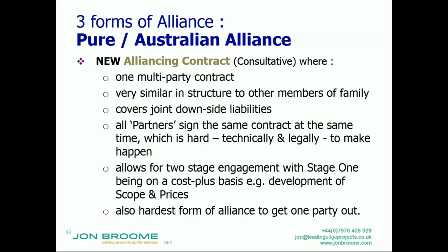This is one multi-party contract which all parties sign at the same time. It's very similar in structure to other members of the family. It does cover joint downside liability. So if my project comes in late or over budget, you will take a share.